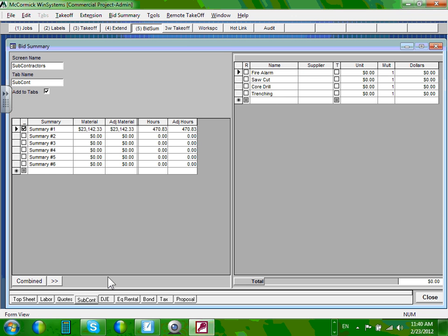Now, what is a subcontractor? A lot of people are not good with low voltage. He has no idea how to install a fire alarm system. But he's an electrical contractor though, and part of the job is to do low voltage. So what do you do? You subcontract it to a low voltage contractor who can do it better, faster, more efficient, on time, right? Than your electricians who are going to be kind of struggling. Yeah, cheaper and so forth. So that's most of the time you do it for the low voltage subcontractor.